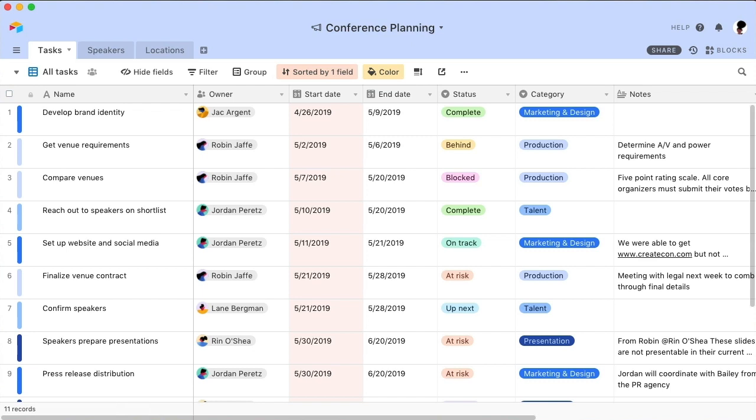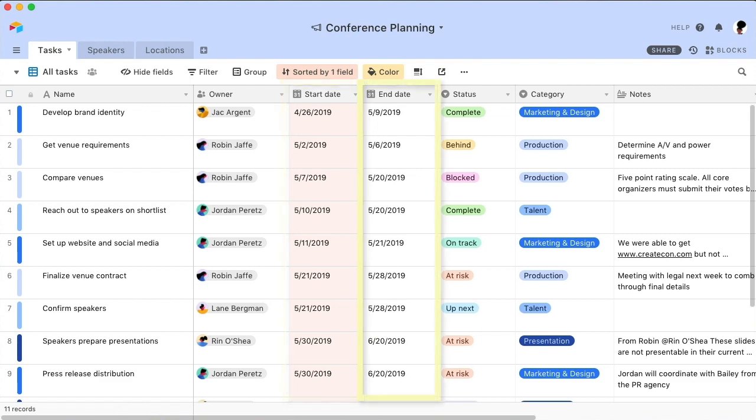To set up your Gantt block, make sure that you already have a table containing the records you want to plot on your Gantt chart. This table needs to include two date fields, one for start dates and another for end dates.